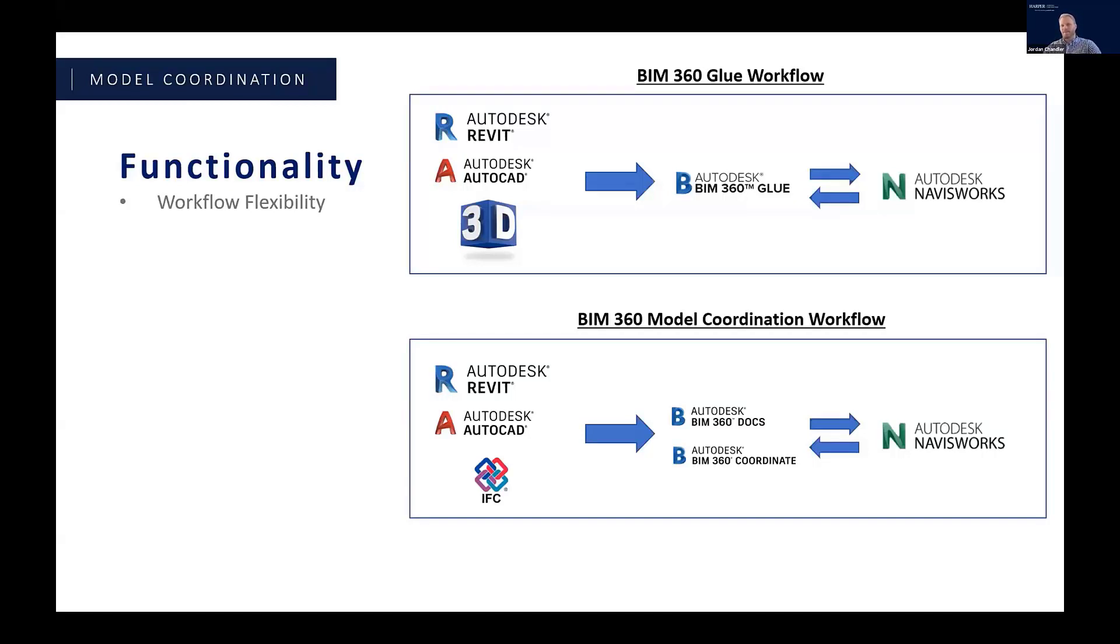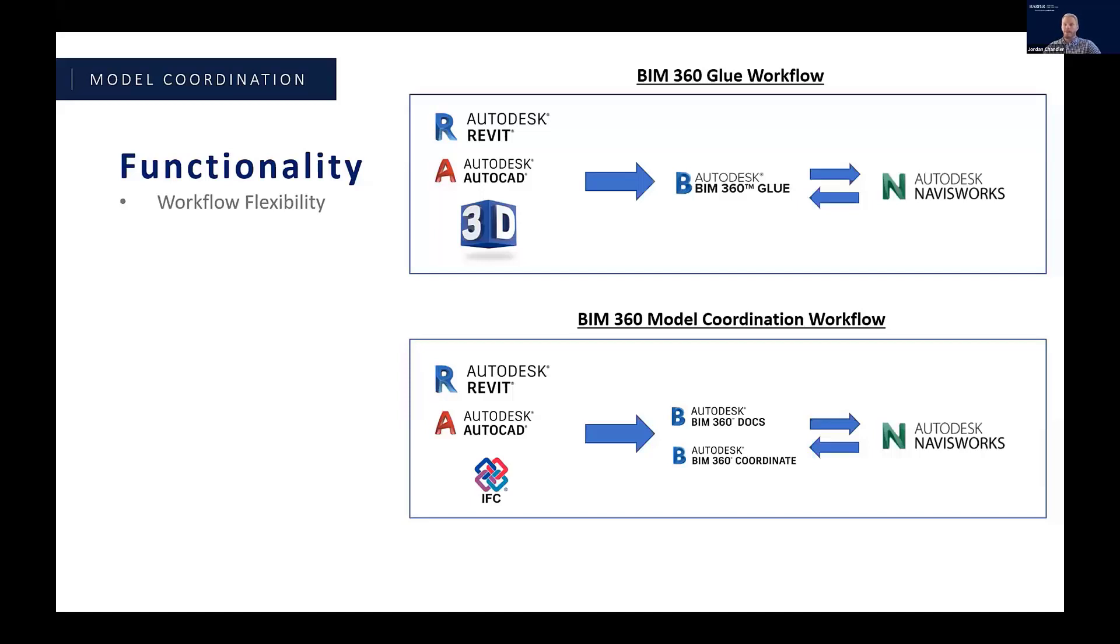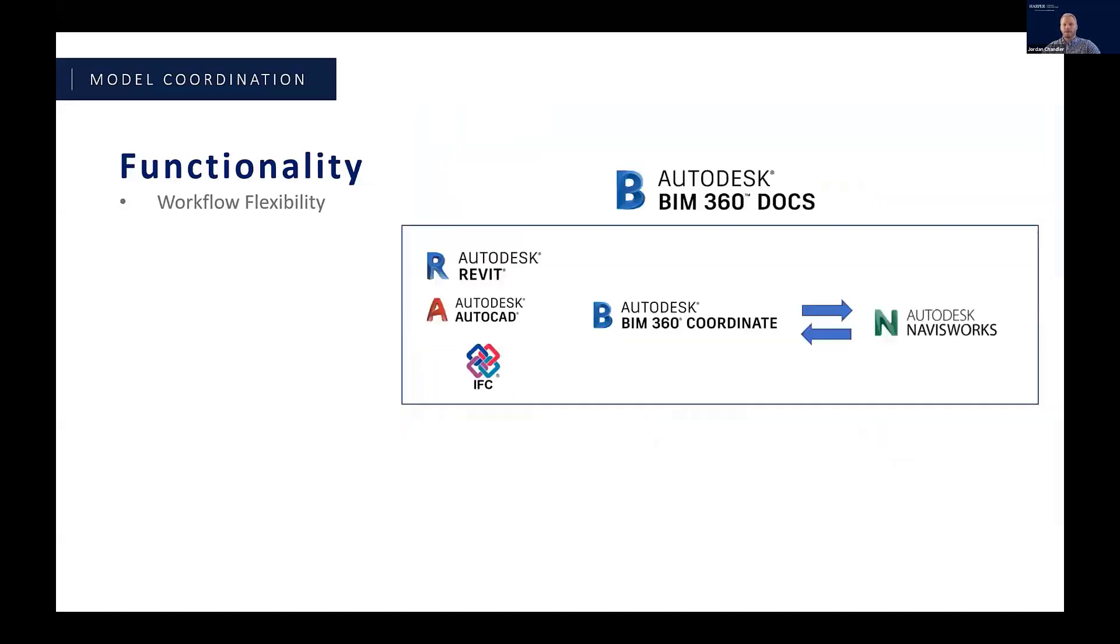You can set it up so that it virtually mimics the Glue workflow. If your team maybe isn't working inside of BIM 360 or you've got a different file exchange, for example, you could set up a coordination space inside of BIM 360 and simply have your collaborators upload or publish their data to that folder, similar to like they would push up to Glue, and then you can use the BIM 360 coordinate platform to run through the coordination process. And as of recently you can now also use Navisworks in that process to open up those views to push issues back and forth.